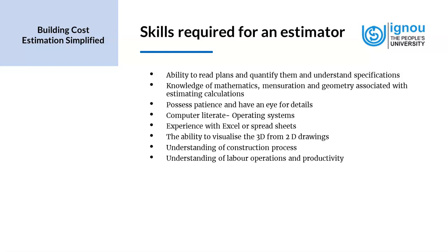Understanding of labor operations and productivity. This is also an important skill, because the productivity of labor has a bearing on the cost of the project. Sometimes it is also important for the estimator to have an idea of the project timeline, to understand how the productivity can vary over a day while working extra hours, or even while working during rainy seasons. Sometimes the productivity in a rainy season may not be the same as in a non-rainy season. So these have to be factored into the estimate by the estimator.